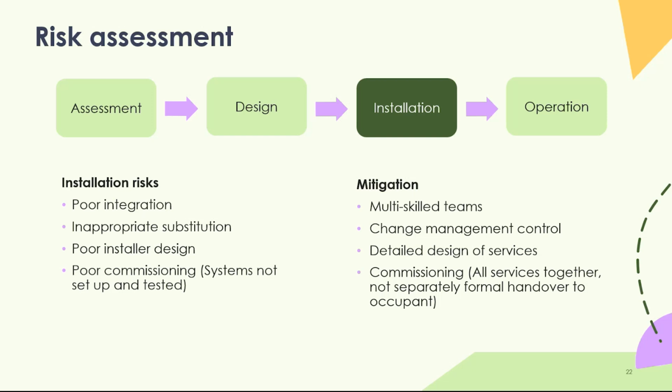And so it had a real impact on the people using those properties, and it wasn't appropriate. So there are times when certain materials, yes, you can substitute, but you have to have someone double checking that, I think, to make sure that what you're doing is not going to have an unintended technical consequence on the fabric of the building and the integrity of the design, but also on the way that people use that building as well.